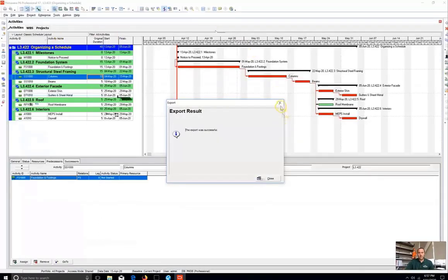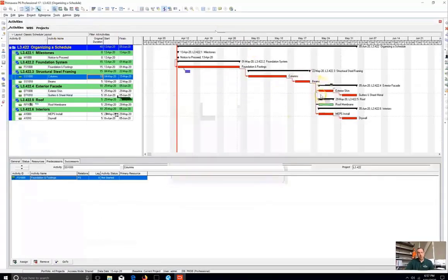If you want to make it perfect like mine, the linking should be not just completely linear, but I want to see some type of logic that you actually thought about, okay, how does this house actually get built. Residential is typically linear, but you can have 2 or 3 things going on at once a lot of times. So it's not just, let's say, once you get your framing done, yeah, you're going to start your exteriors, but you can also start your roof. And really, you can start some of the interiors as well. But that rubric should answer more questions.